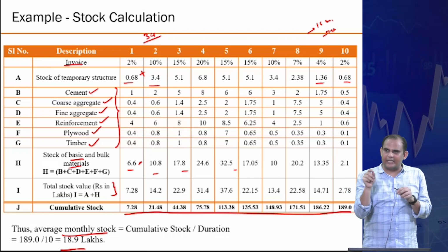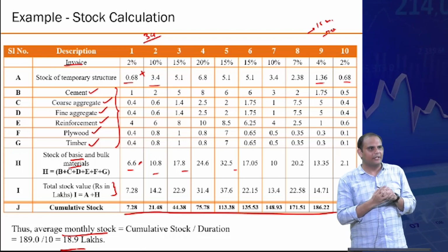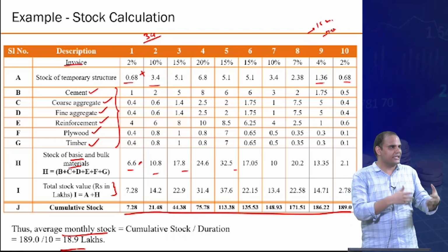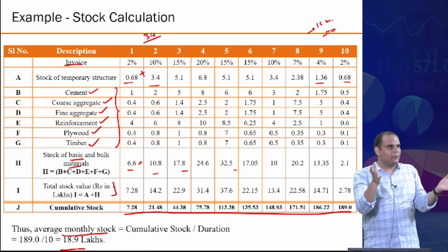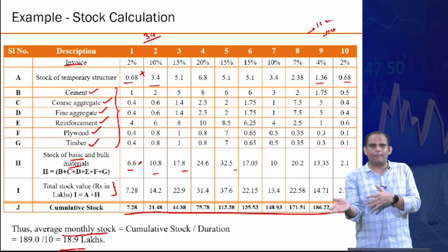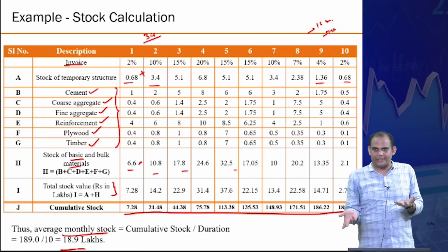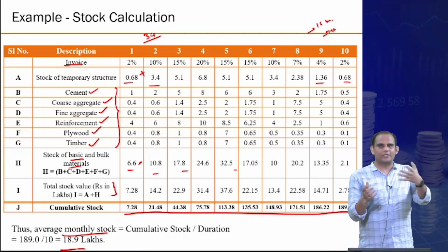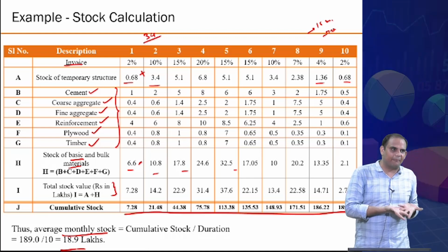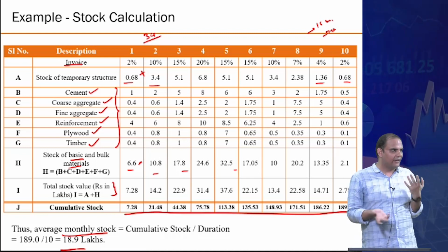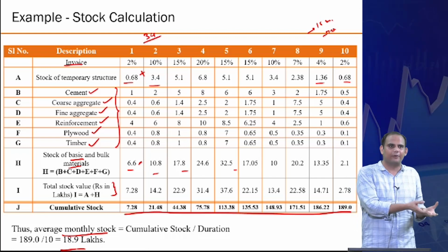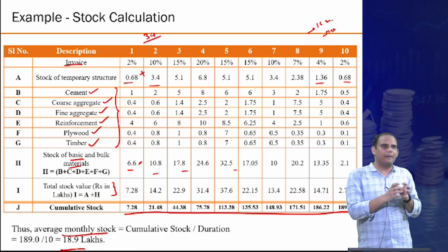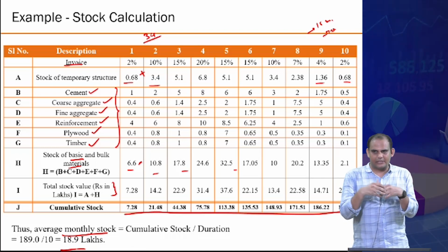And that is why most of the contracts you will see have this condition that for a particular project size, the client's financial health is also seen, right? That's a criteria. If you are doing 1,000 crore projects, you can't give it to a company whose annual turnover was 1 crore rupees, because you will easily expect that for a 1,000 crore project, 250 crores or something like that could be the working capital requirement. Now a company with total turnover of 1 crore, how will they raise the money of 250 crores to get a working capital, right? So therefore this criteria of financial health, that a company can actually meet, temporarily you need to support that much money, right?